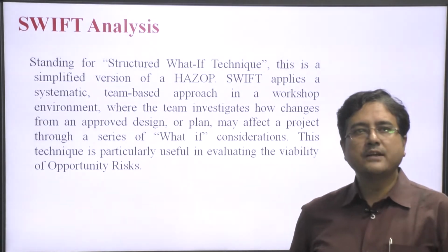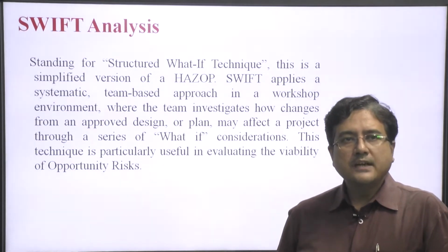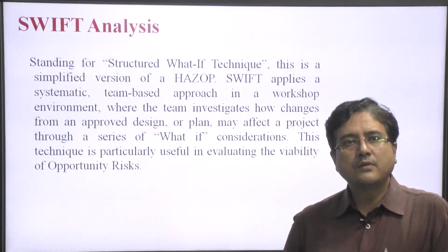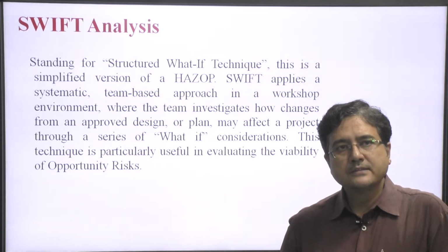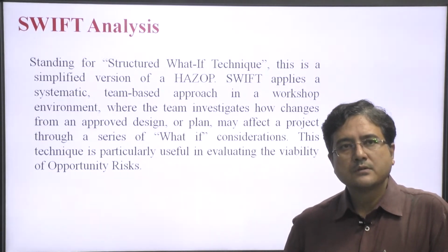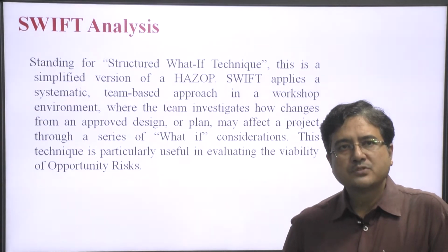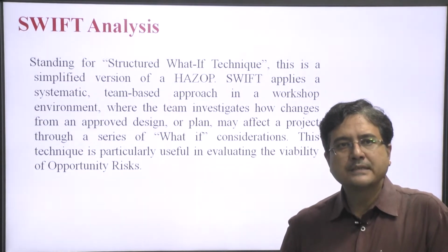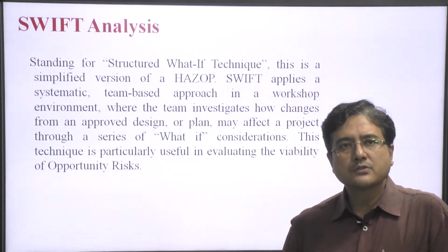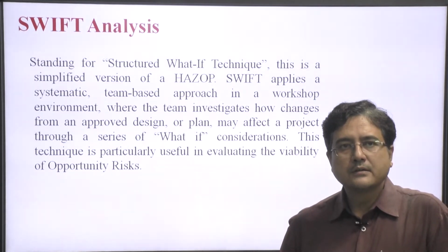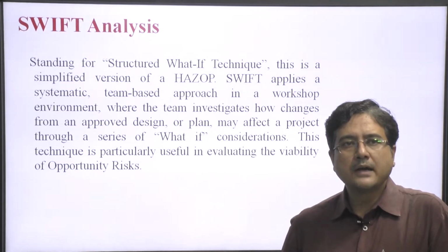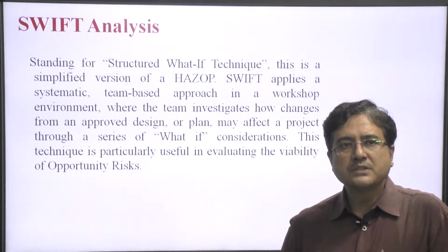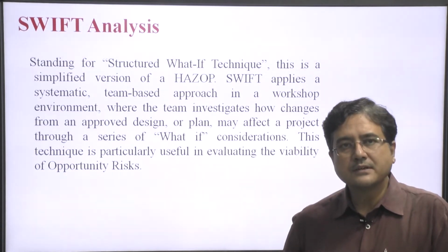The next analysis is SWIFT analysis. It stands for Structured What-If Technique. This is the simplified version of HAZOP. SWIFT applies a systematic team-based approach in a workshop environment, where the team investigates how changes from an approved design or plan may affect a project through a series of what-ifs.